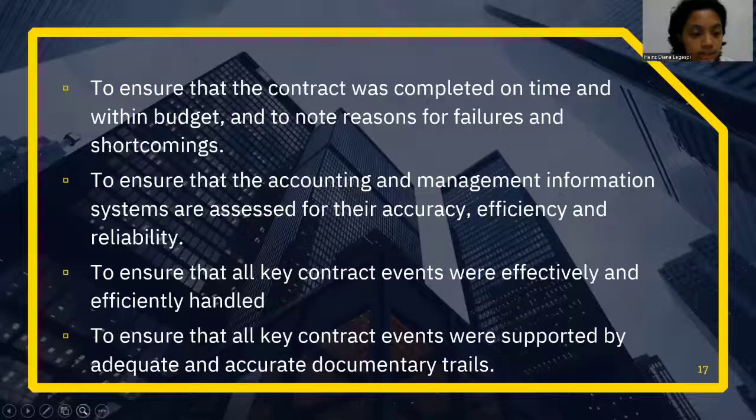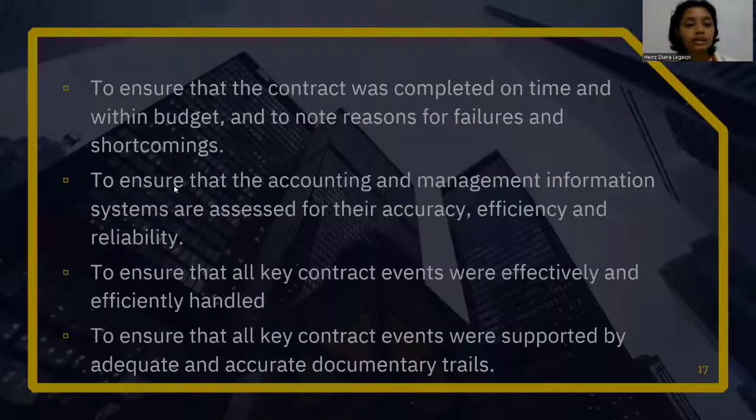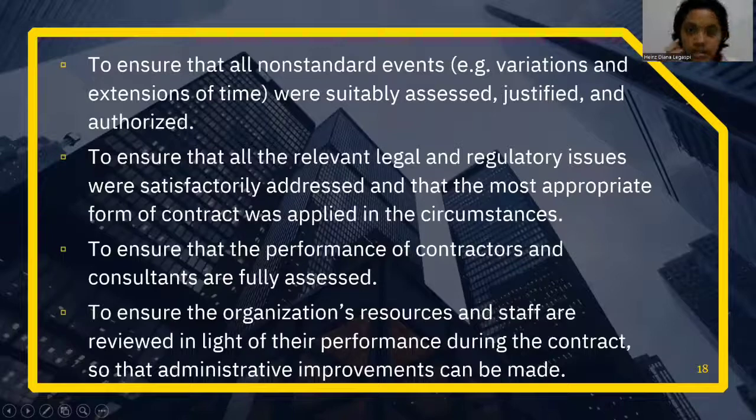Next is to ensure that all non-standard events, for example, variations and extensions of time, were suitably assessed, justified, and authorized. This is to guarantee that all non-standard occurrences were properly evaluated, justified, and approved. Next one is to ensure that all the relevant legal and regulatory issues were satisfactorily addressed and that the most appropriate form of contract was applied in the circumstances.